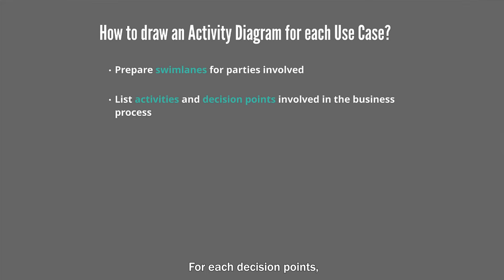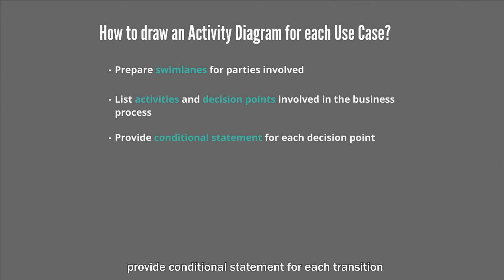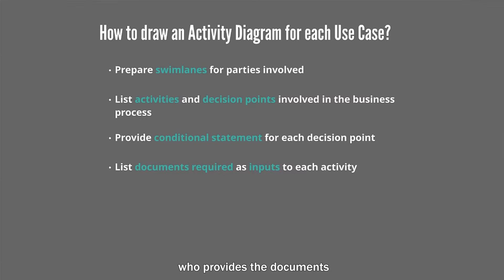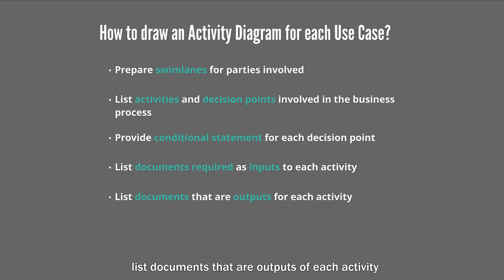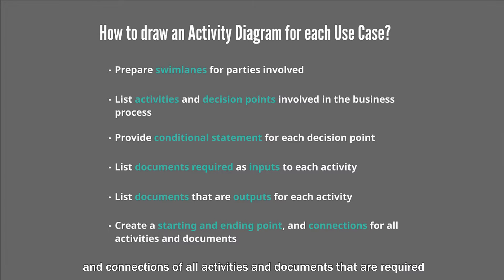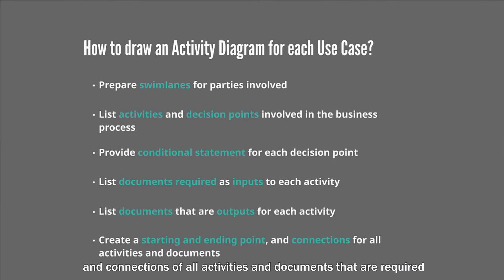For each decision point, provide conditional statements for each transition. If applicable, list documents required as input to each activity and categorize them according to the party who provides the documents. If applicable, list documents that are the output of each activity, and create a starting point, ending point, and connection of all activities and documents that are required.